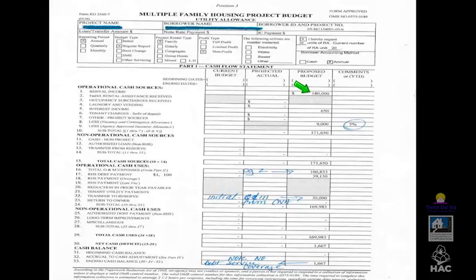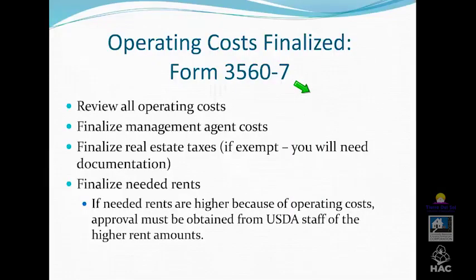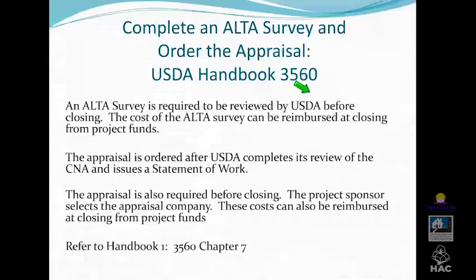Before the project is put out to bid, USDA has to approve all of the final documents, the final drawings, the specifications, and the bid packet. And they'll oftentimes have comments on these that need to be addressed and resubmitted. So again, I would suggest as soon as you have those documents together, submit those to USDA, and the state architect will review those, and then if there's any changes that need to be made, those changes can be made,